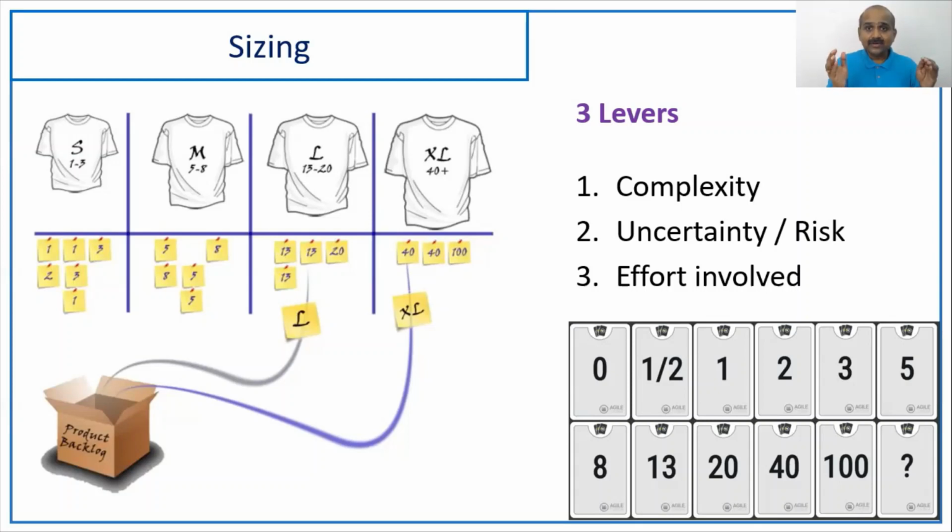Why? In the real world, if we take more number of days to accurately estimate, the assumptions that we take while estimating a story are not actually true. When the assumptions are not true while doing estimation, then the outcome of the estimation is wrong. Then Agile says, don't go for very strict, very fine, very precise estimation. Rather, go for relative size estimation, which is very easy.